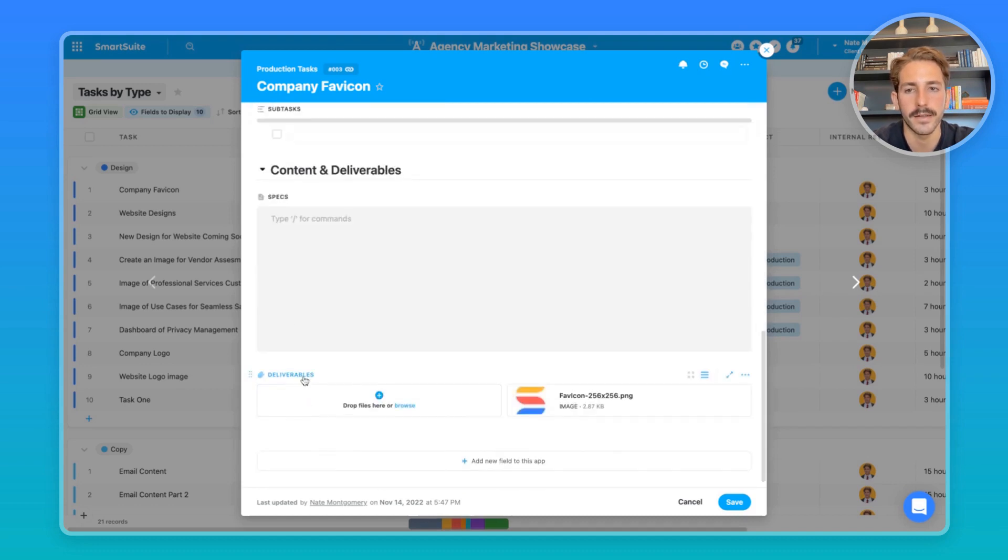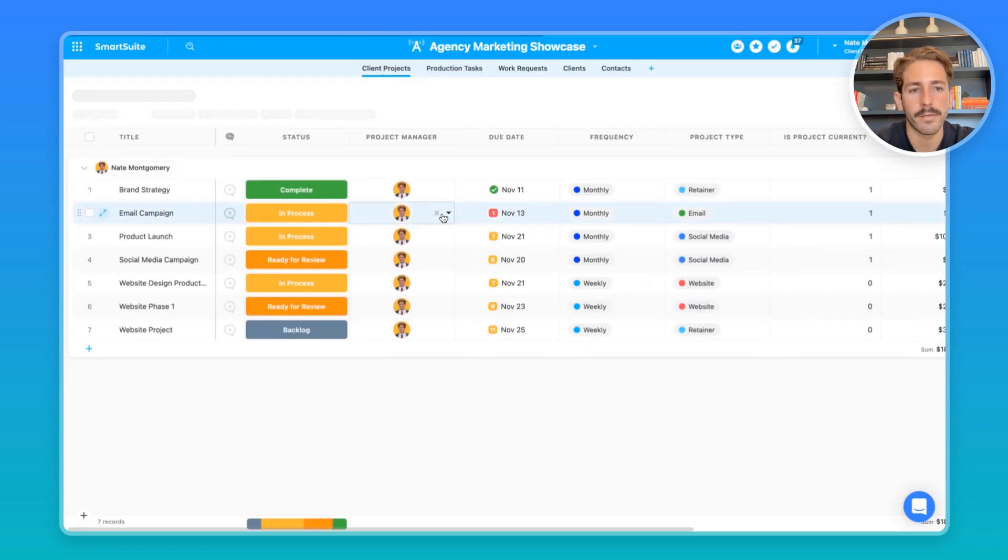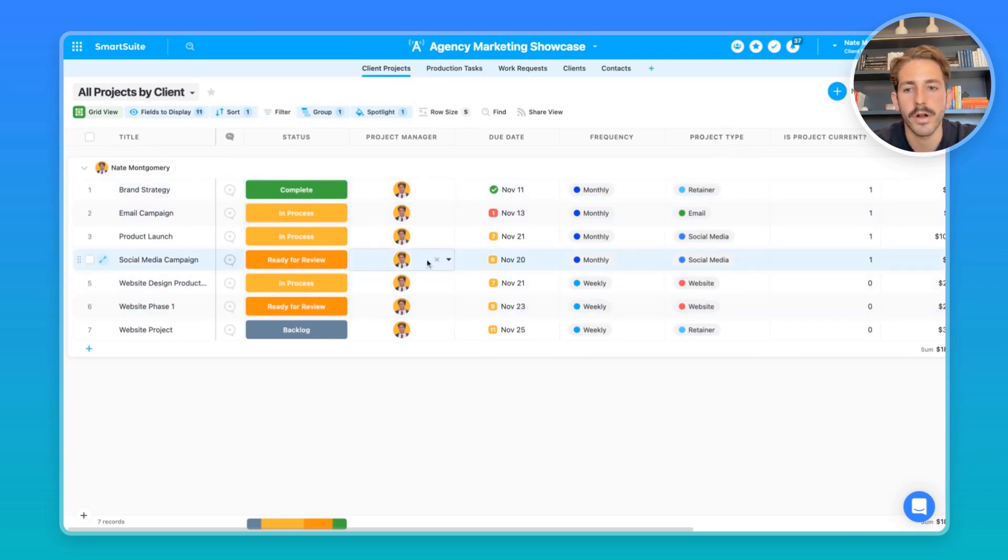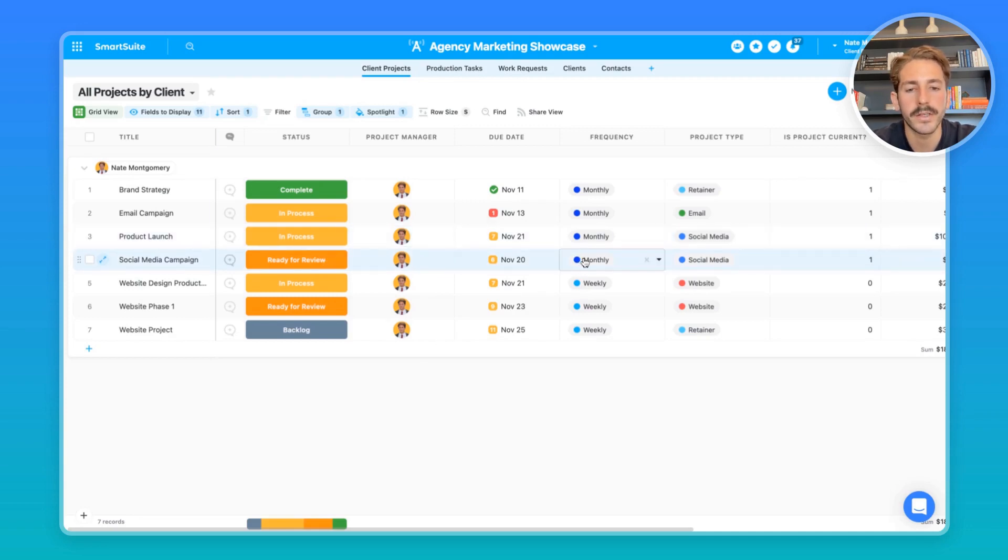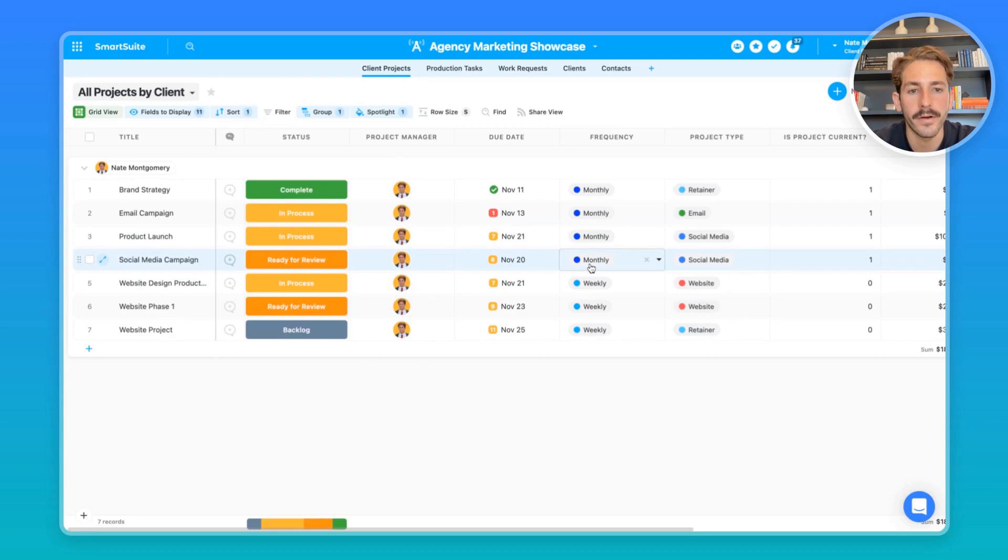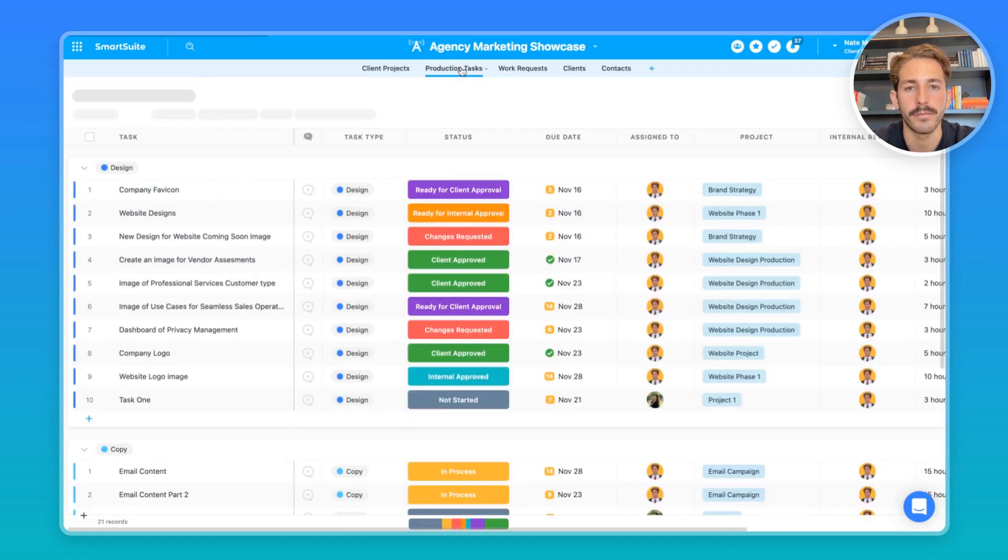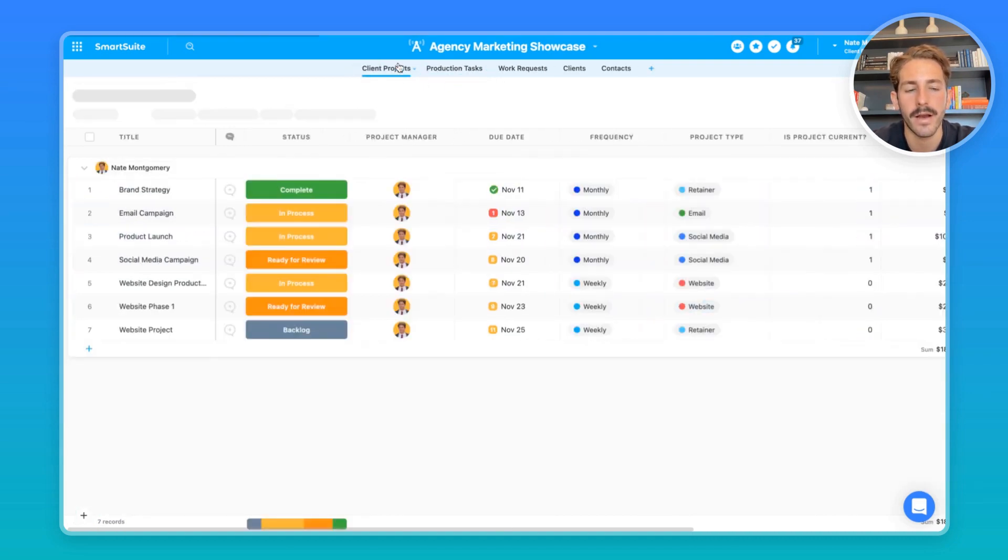Subtasks and then content and deliverables. If you create a project and it's a certain type of project, you probably have a set of tasks that need to happen based on the product type. So let's take this project here, for example. It's a monthly project. Once December hits, it's going to create a new record, and because it's a social media type project, a templated set of tasks are going to be created inside of the production tasks app.